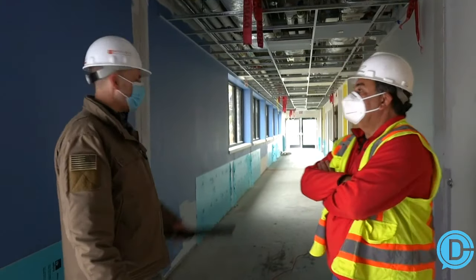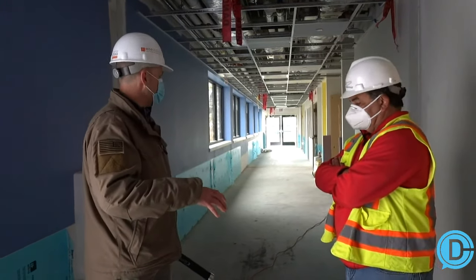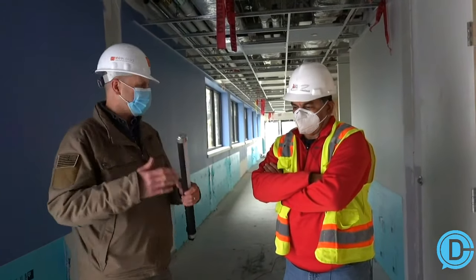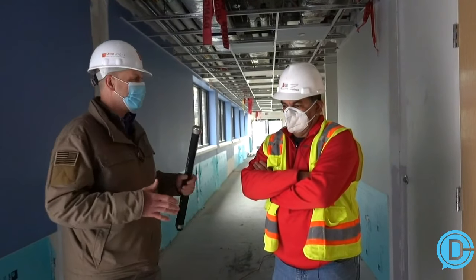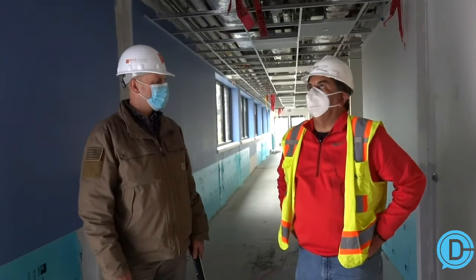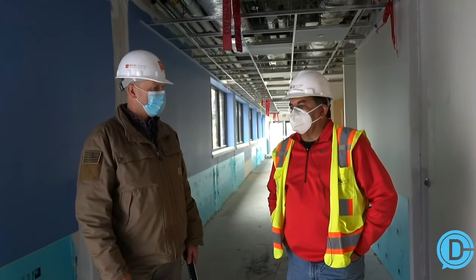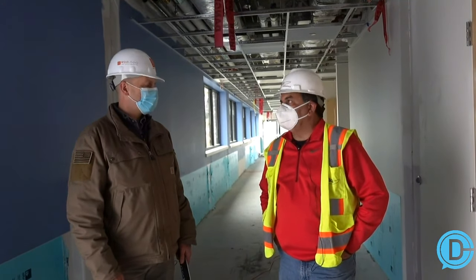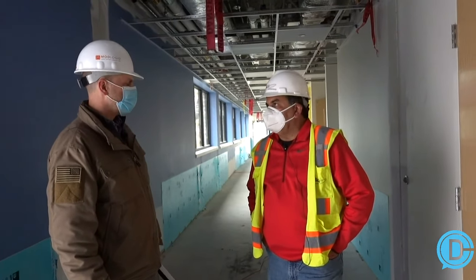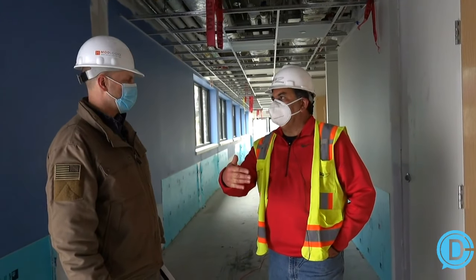We saw all the product in here. Let's kind of talk about a little bit what's next. Is there inventory that you guys will do? Is there an organizational process that happens with all the supplies in here, so everything gets organized and put in the right place? Yes. What's going to happen now is over the next day and a half, our project manager and superintendent will go through all of the ship loose lists, check and double check everything. It was already done down at MODLOGIQ. Right. It'll be done again up here.